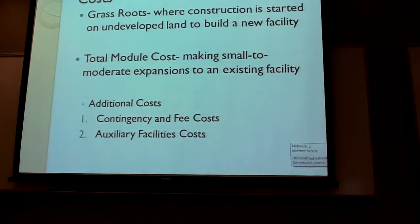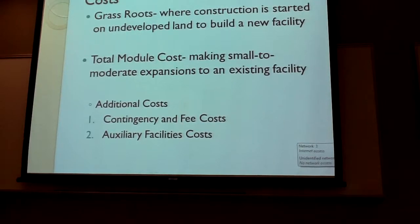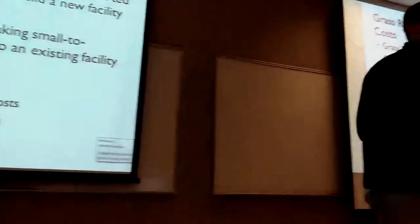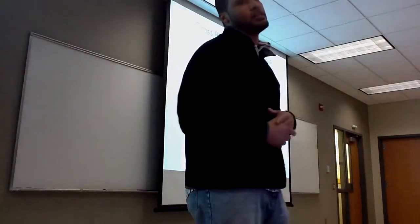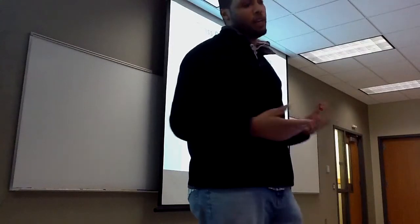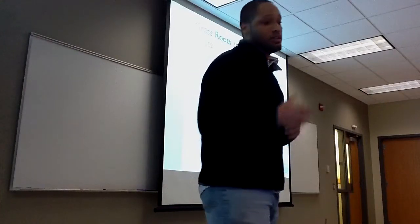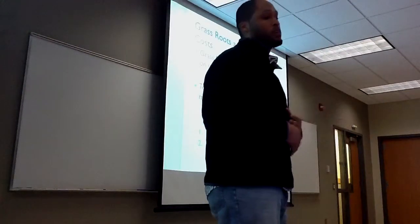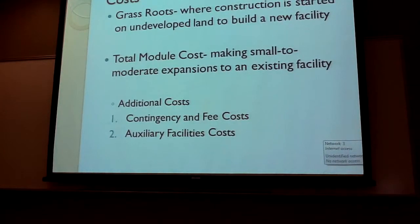Next, they talked about how to calculate grassroots and total module costs. Grassroots refers to where construction starts on undeveloped land to build a new facility — your plant. Total module cost involves making small to moderate expansions to an existing facility, such as adding a new building or a new reactor to a plant site. These costs — grassroots and total module costs — require adding additional costs such as contingency fee costs and auxiliary facility costs.